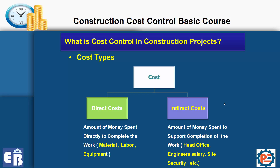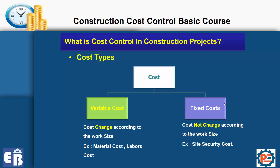In construction projects, indirect cost is usually expressed as a percentage of your budget — for example, 10% of the contract value spent on indirect costs, with the remaining 90% on direct costs. We also have variable cost and fixed cost. Variable cost changes according to the work size, like material cost and labor cost. Fixed cost does not change according to work size, like site security cost. This is the types of costs — general information for the first lesson, as we may use some or all of these in our next videos.